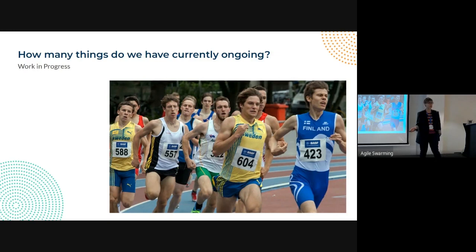How many things do you have currently running? So this is the item when we think about how many things the team can work comfortably on, but also how many things you personally can work on. But it's also important to think about it not only on a story level, but also on an epic level. And honestly, that's the biggest game changer, when you start thinking about how many things the team can work on comfortably on these bigger functionalities.